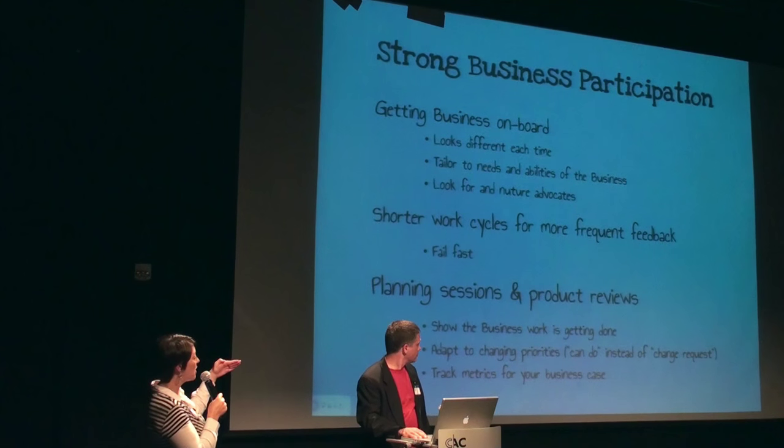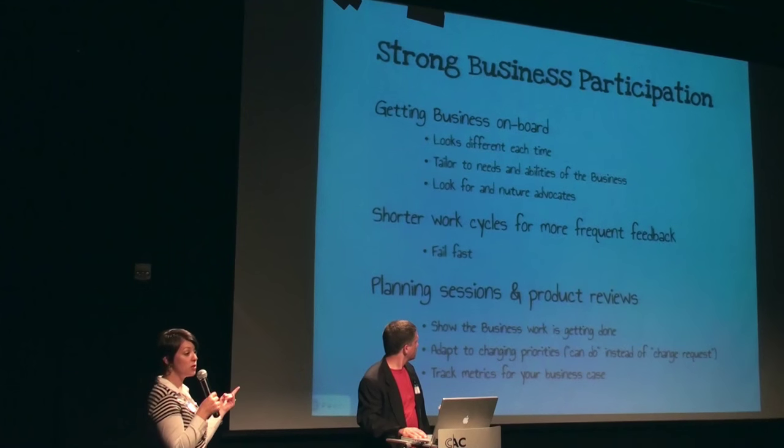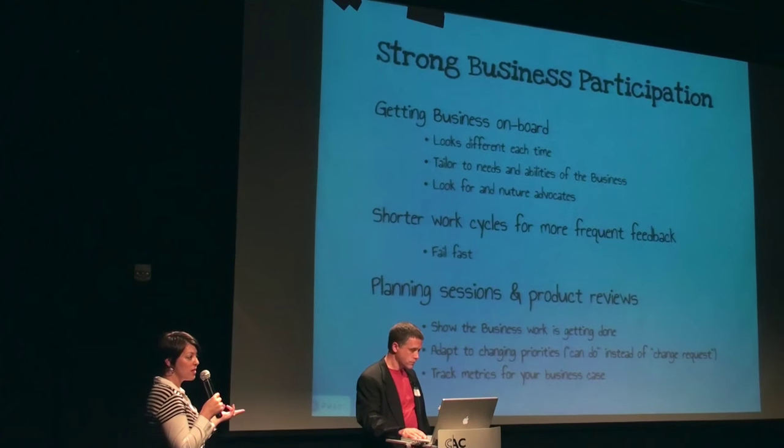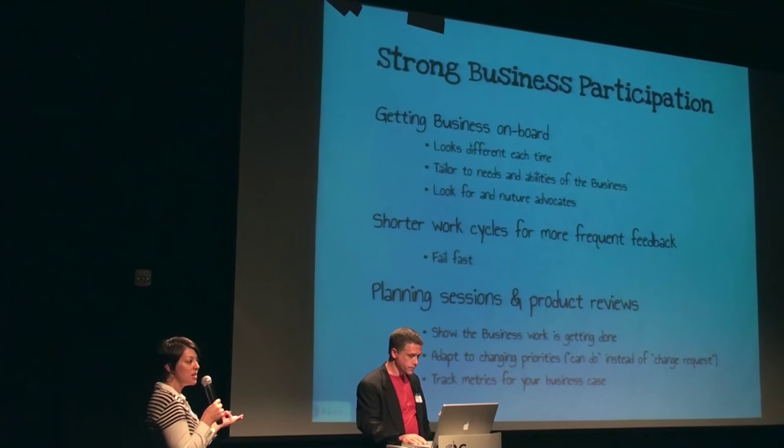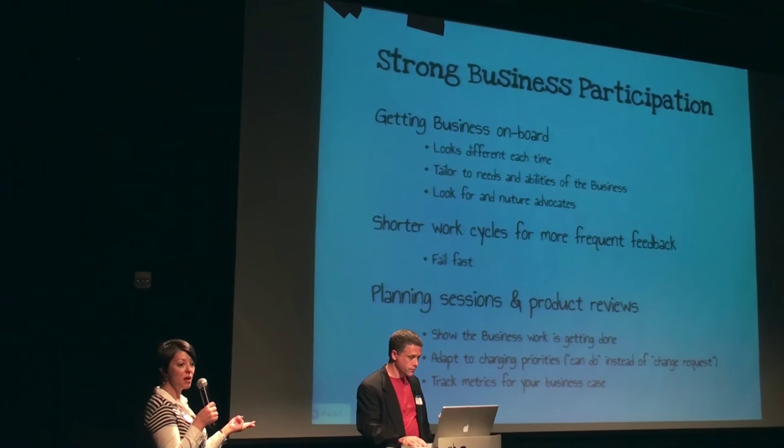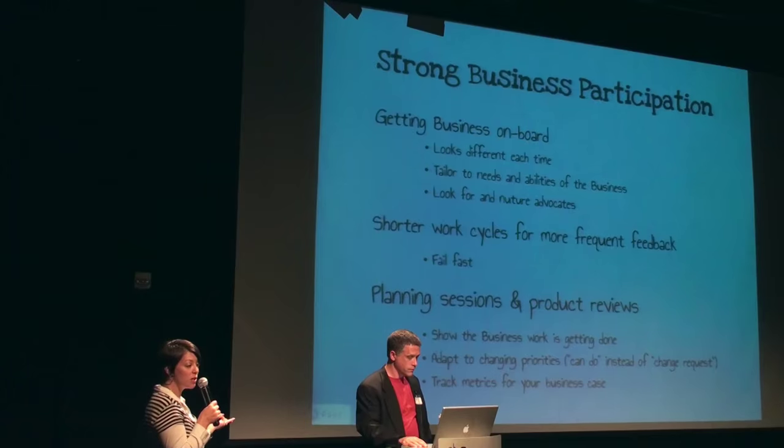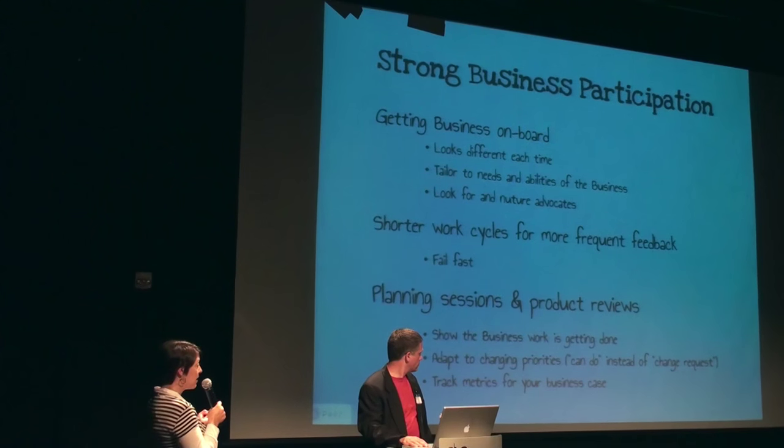And then from there, especially with the developers or the team, that integrated team, using that frequent communication to go back to the business and, one, show them that work is getting done. Because if you're working in a different way, there tends to be a lot of mystery and cloud there to where they think, well, you haven't given me an updated spreadsheet or Gantt chart. Something must not be getting done. So going back and showing those demos for your shorter iterations and work cycles, you gain trust very quickly because they see, like they haven't seen before, that work is getting done.